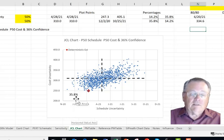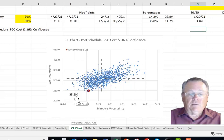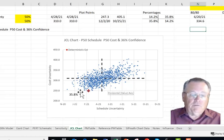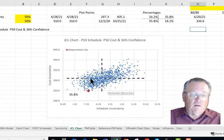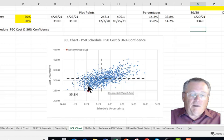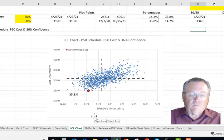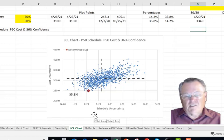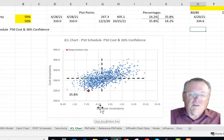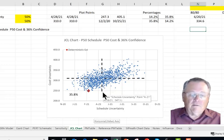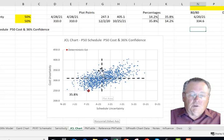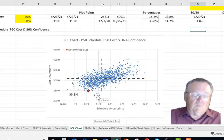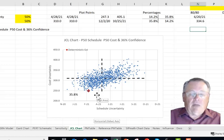If you were going to budget at this level, you would then budget between 250 and this looks to be around 310, so you budget a contingency of about 60 million dollars. I don't know if you really have contingencies on schedule, but you would then put in your plan this schedule here for completing the project and everyone would plan around that date.